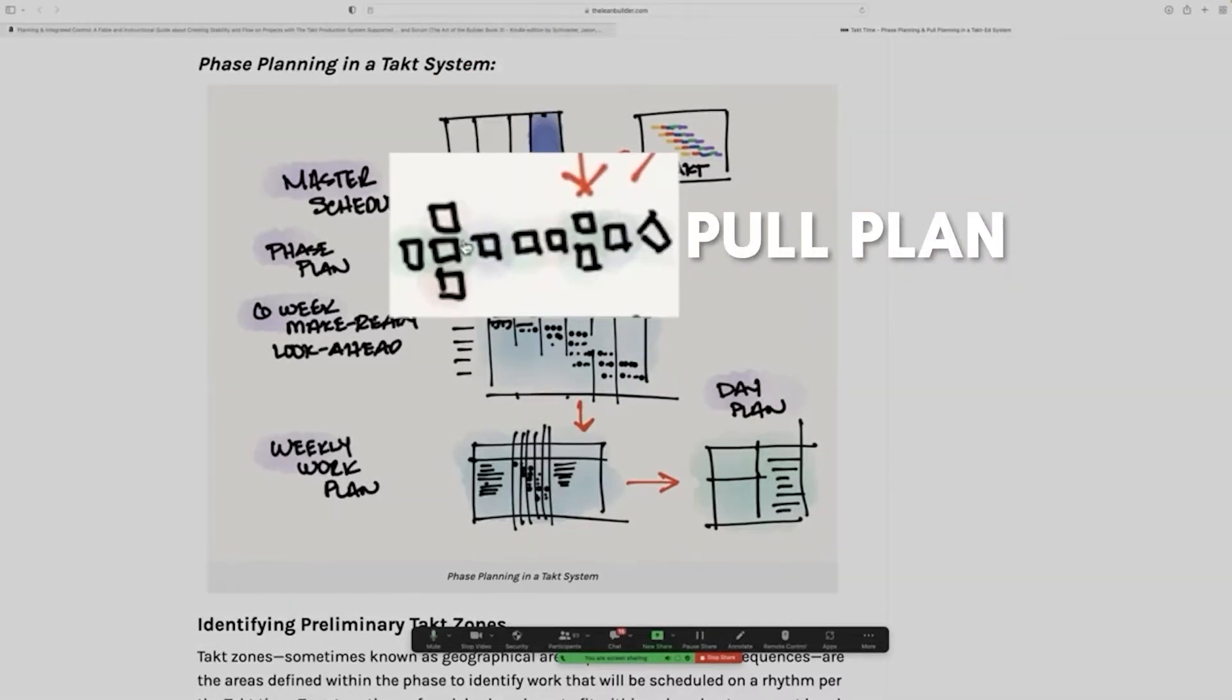Then you go create a pull plan. And if you don't have your trade partners, you do the best with your sequence, with quantities, with production rates, with historicals. But if you have trade partners, you do a pull plan.